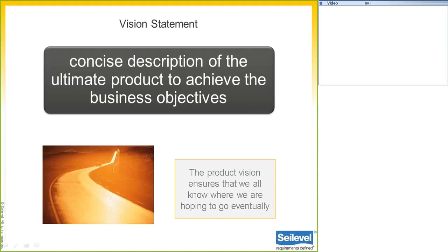So you might encourage key stakeholders to draft their own vision statements, and this will help illustrate the different understandings about their objectives. And even if you're well into your project, it's never too late to do this exercise. I mean, we come into projects all the time where not only are there no business objectives or success metrics, but there's no real, clear vision for the project. And helping them draft a vision statement is a good first step to getting us pointing in the same direction in terms of objectives. So, this helps you fix that lack of focus and clarify the direction as soon as you possibly can.